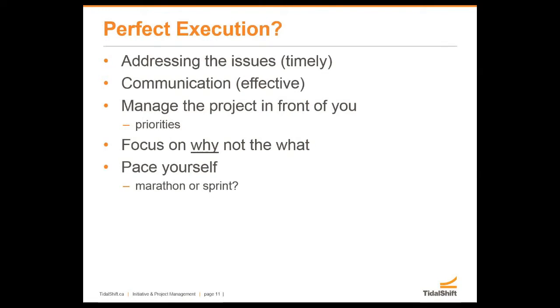So to give you a quick example, when I used to work at a major financial and manage a technology group there, our year end was an all hands on deck work through the weekend scenario. Well, guess what I didn't expect from my team Monday and Tuesday of the next week? There needed to be that balance. And I see people do this with projects over and over again. They get into these long-term projects, and then they try to run them like the short-term small projects. So you want to find the appropriate pace for the project, and then run it that way. And of course, that can involve some negotiation with management, et cetera, to get the appropriate resources.